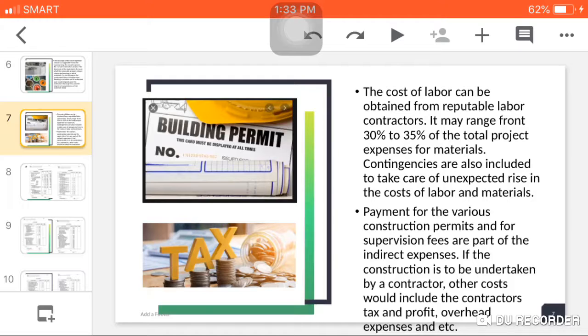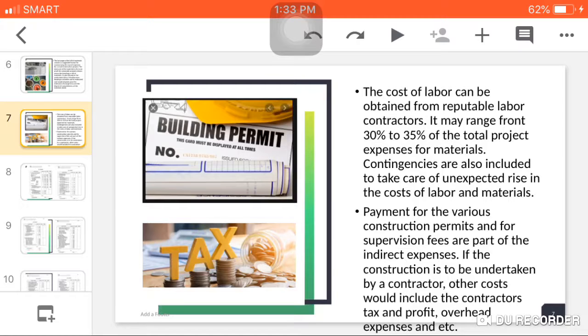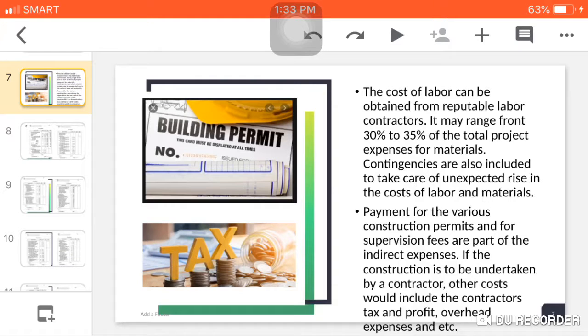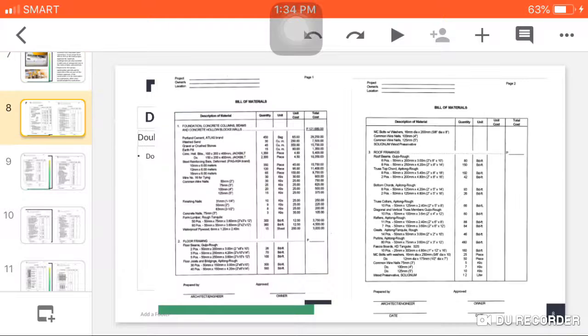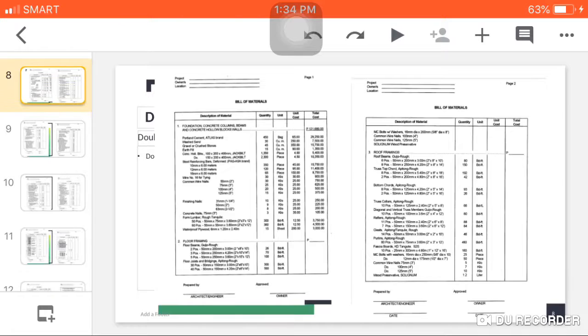Payment for the various construction permits and supervision fees are part of the indirect expenses. Construction permits and supervision fees are indirect expenses. Tax is also an indirect expense. If the construction is to be undertaken by a contractor, the other costs would include the contractor's tax and profit, overhead expenses, and etc.